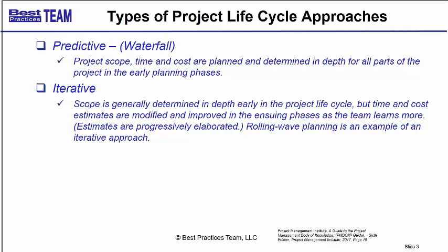This is rolling wave planning. Plan in waves. Plan in 2, 3, or more waves for your plans. This is one type of progressive elaboration. It's one type of iterative planning.